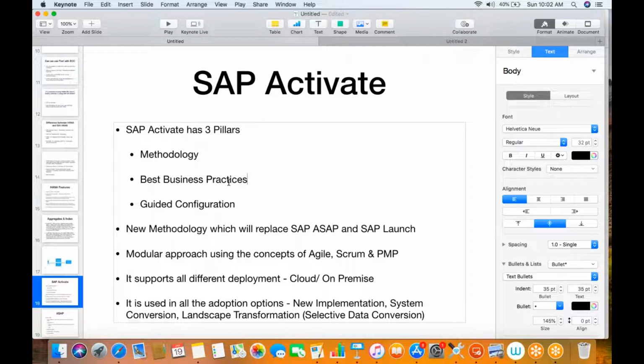So that is where our expertise will come into place, right? So for example, if you think that one process is dependent on another, so till the time the second process is not getting developed, we cannot implement the first process. So that particular process can be skipped in the first modular approach. So whatever is fit, you can implement that. Whatever is not fit, if you think that whatever is fit is not enough, you cannot go ahead only with these changes, then maybe whatever are the mandatory things to develop, wait for that and then go for the first phase.